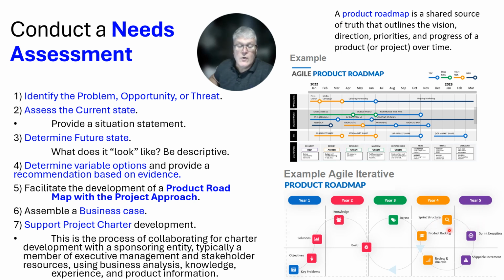Okay. So once you have all that information together and you've conjectured as to what your approach is going to be and how you would conduct that approach, you would develop your business case. After the business case is developed, then you would promote a project charter. Okay, the project charter, it's a process of collaborating for charter development with a sponsoring entity.